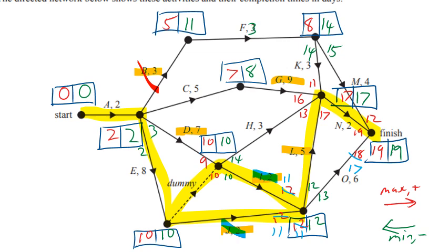But going up here, 11 plus 5 makes that 16, but we can crash this as well and make that 4. So that takes one off and makes that 15. And then 15 plus a 2 makes that 17. So we've got two 17s coming in now. So we've got 17. That looks pretty good.